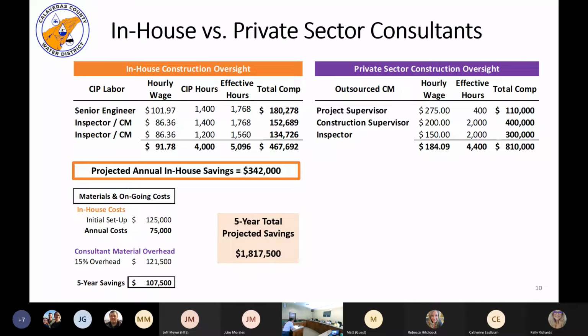It might be 4 or 5 months from today before we actually put a shovel in the ground. Which is usually how long it takes to get a qualified staff person in-house and up to speed. And with the construction season approaching, that's why we think we don't want to wait until the fiscal year. We're asking for approval now.